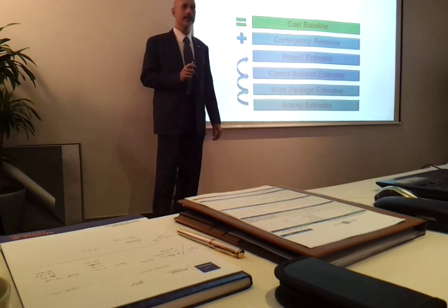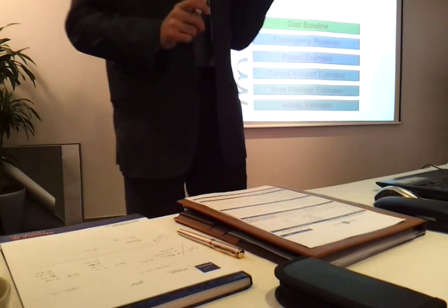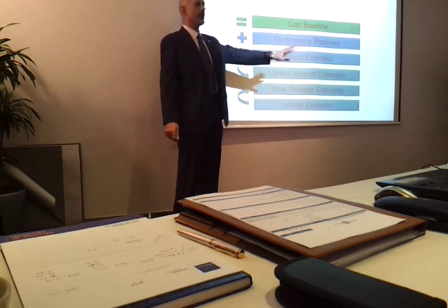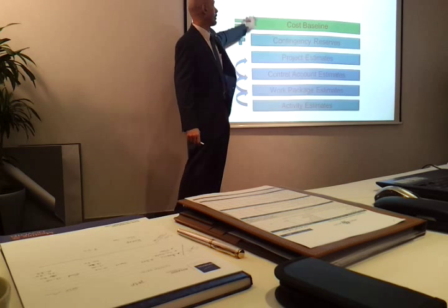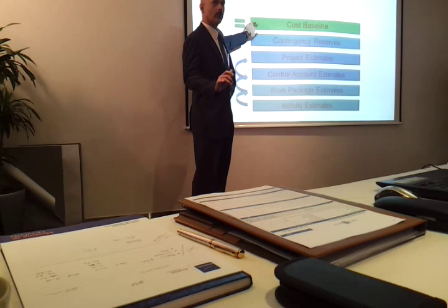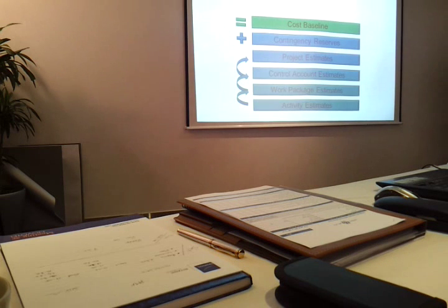Do you know what a baseline is? This is your basis, your foundation, for cost baseline. So all these give you the cost baseline. Now, you as a project manager, your job is finished here. Truly, even though we still got some space. But you as a project manager, this is all you can do. This is your cost baseline. You give the budget to the sponsor, the project sponsor or the project owner. They add their own management reserves. Okay? They trust you. They're confident of your estimates, but they like to play it safe.